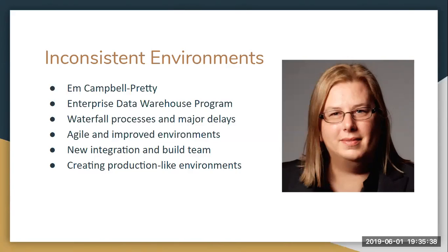To try and solve the issue, Campbell Priddy held a program-wide retrospective meeting. At the meeting, she asked how they could double their productivity. The answer became clear. It was to improve the availability of provisioned environments for developer teams to work in. This process usually took about 8 weeks.